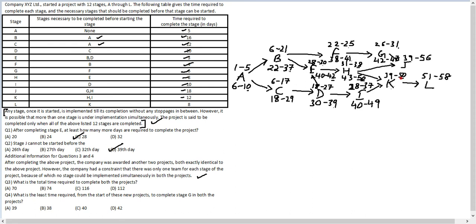For project 2, stage K has constraints at days 50 and 49, so it starts on day 51 and goes to day 62. Stage L has constraints at days 58 and 62, starting on day 63 and going to day 70. Stage J has constraints at days 47, 50, and 56, so it starts on day 57 and goes to day 74.